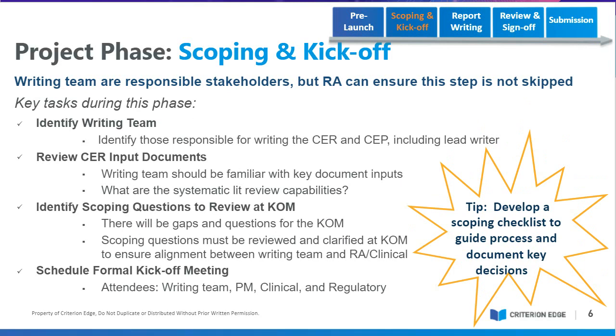Scoping and kickoff. So if you've done all your pre-work, you're ready to start the project. It has a beginning, as I always say, a middle, and an end. So we're going to start that. So what does that look like? Key tasks during that phase. Identify your writing team if you haven't already, and those responsible for writing the CER, CEP, who is your lead writer if there are other people helping. Know the players and who's responsible for what.